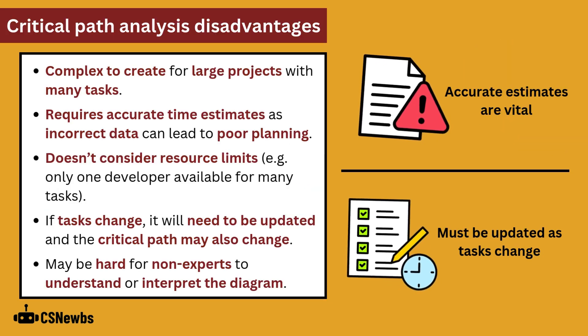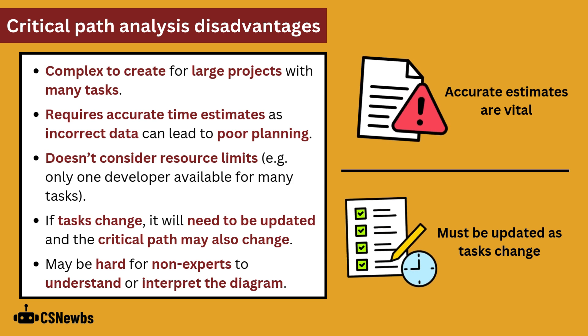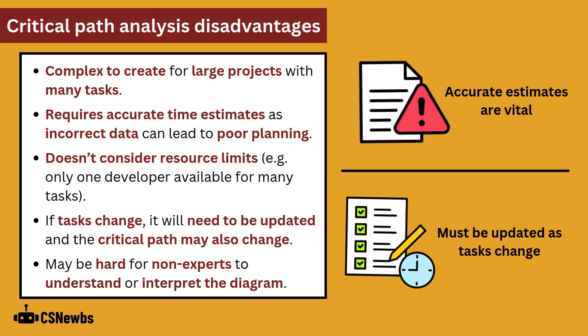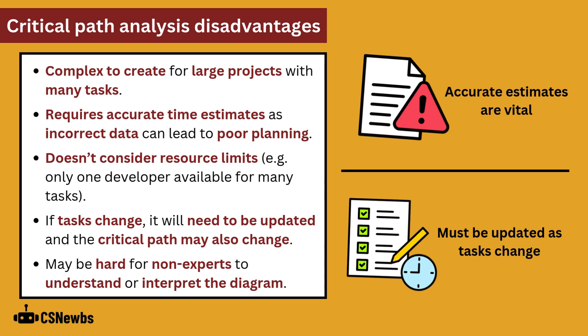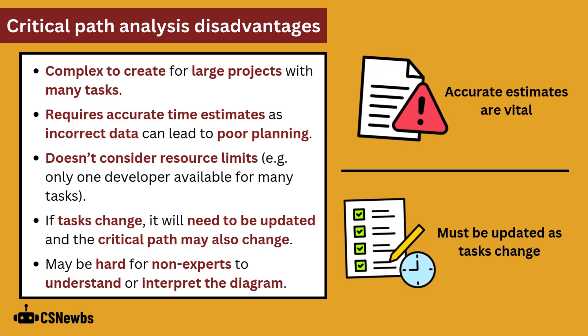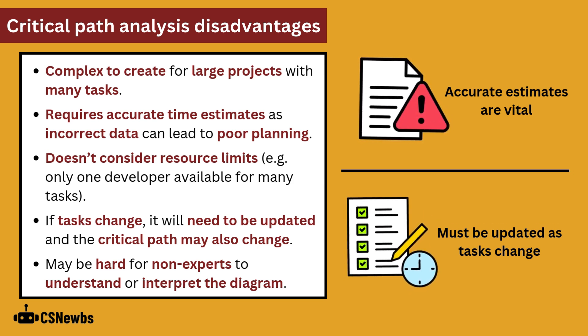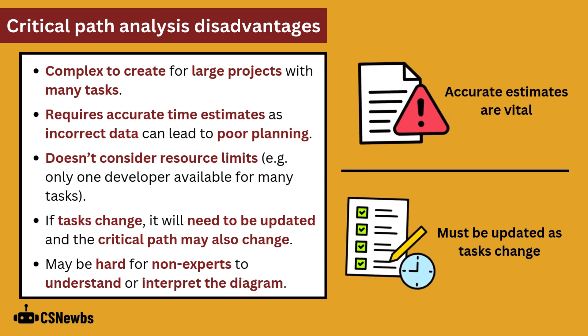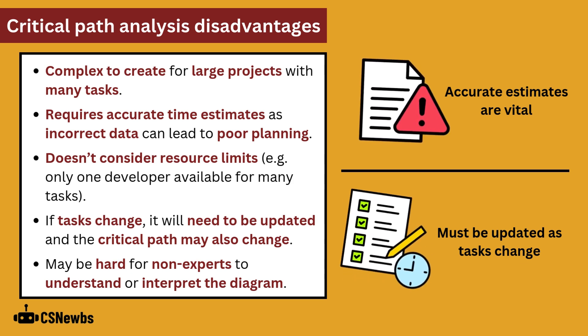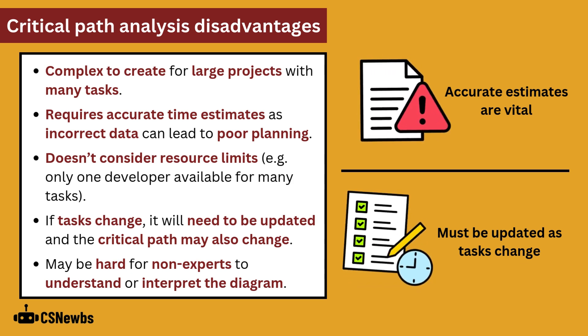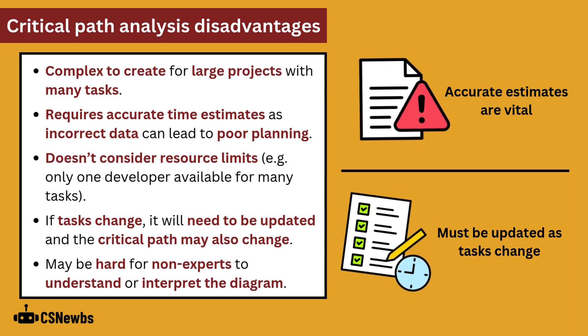However, it is complex to create for large projects with many tasks. It requires accurate time estimates as incorrect data can lead to poor planning. It often doesn't actually consider resource limits. For example, there may only be one developer available for many tasks at a certain point. If tasks change, it will need to be updated and the critical path may change. And it may be hard for non-experts to understand or interpret the diagram.